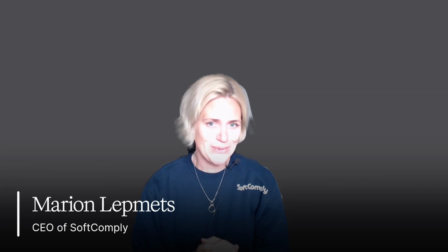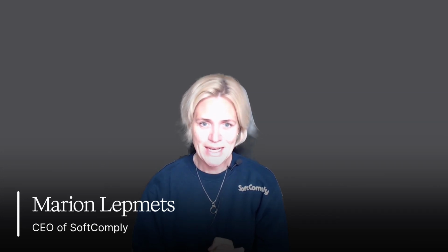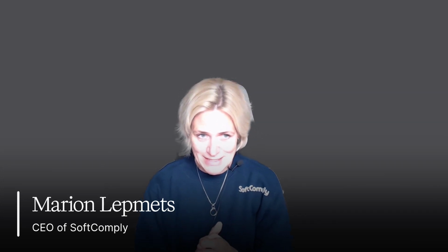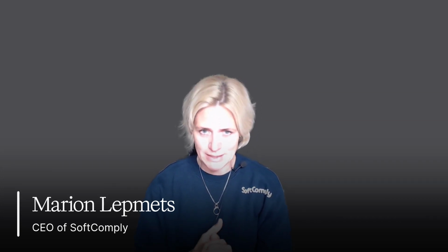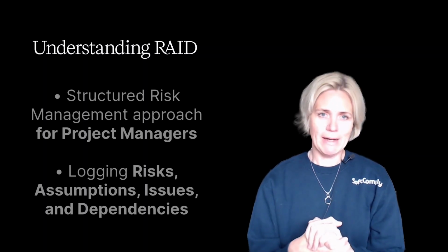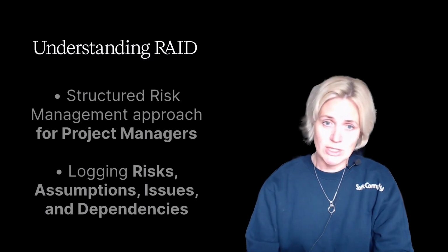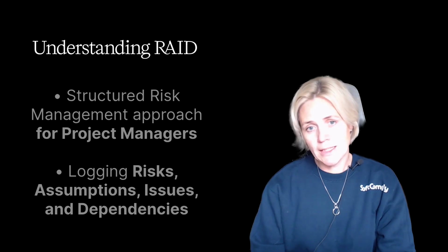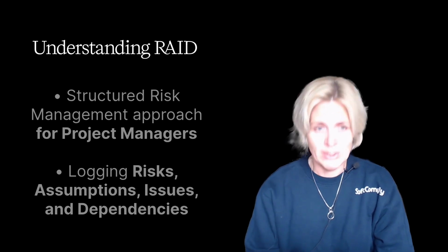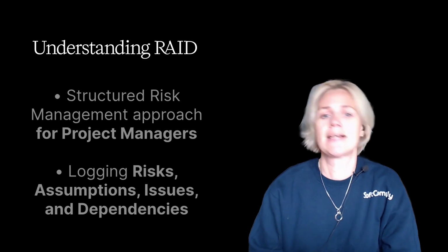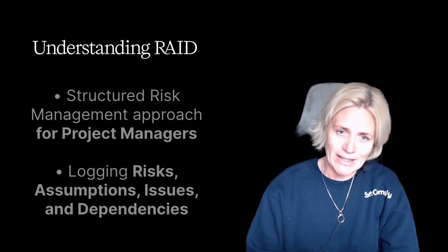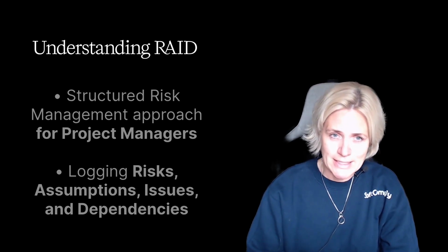Today, I'm going to dive into RAID. Don't worry, this RAID won't delete your files or trigger any alarms, unless, of course, you forget to manage your risks. RAID might sound a bit dramatic, but here it just stands for risks, assumptions, issues, and dependencies. It is a very popular risk management method because it gives project teams a single structured view where they can log potential problems, risks, things they're counting on, which we call assumptions, current obstacles that can be called issues, and external factors that they rely on, which we can call dependencies.